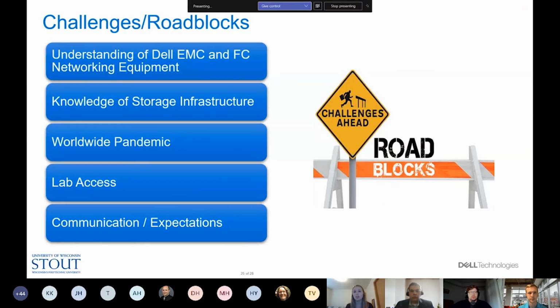After many meetings with our sponsors and hours of research, we were able to start understanding the infrastructure and build our own network. Another challenge within this, as Riley mentioned, was configuring boot from SAN. We were able to configure it successfully for fiber channel, but ended up getting it removed from the statement of work due to the timing of the project.